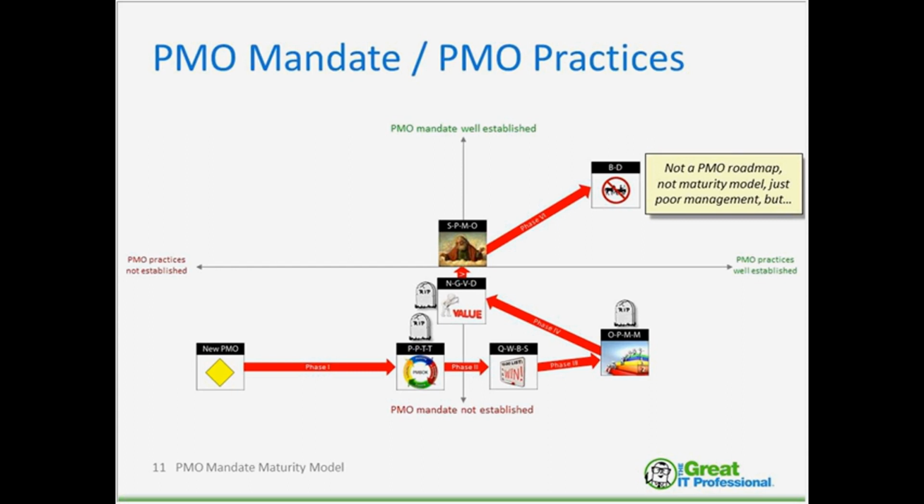Far too often, people have a misguided view of the purpose of the PMO, and they start right away developing a methodology, implementing the tool, staffing the organization, without first truly establishing the purpose of the PMO. Now this phase 1, for most organizations, you can spend 6 months or a year in this phase. But at some point in time, you'll complete this particular phase, and you'll be ready to go to phase 2. And you'll notice there's a rest in peace headstone because this is typically when the honeymoon period of the PMO is over. Everyone is frustrated with the PMO. The leadership team is unhappy. The PMO manager is replaced and a new PMO manager is brought in.